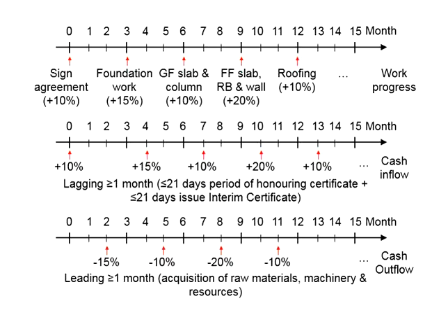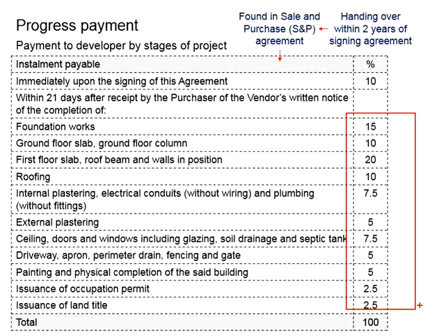In the previous videos, we talked about the lagging characteristic of the cash inflow, taking into consideration the administrative process due to issuance of the interim certificate, as well as the maximum durations specified as the period of honoring certificate. It is reasonable to expect that once you have completed the respective work, there will be a slight delay in terms of the cash inflow in accordance to the quantum as specified by the progress payment schedule agreed between the